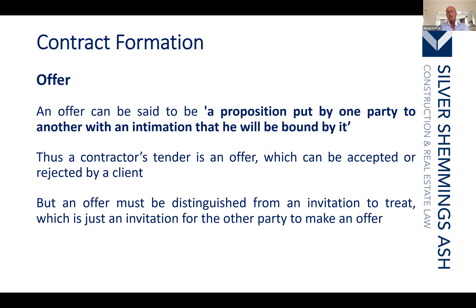Offer is fairly simple — in construction it's generally the offer of a tender. It needs to be distinguished from an invitation to treat. In construction we often send letters inviting contractors to tender — that is an invitation to treat. Similarly, when you see a mispriced item on a shop shelf, that is an invitation to treat. When you pick it up and take it to the till, you are making the offer; the person taking your money is accepting it, creating a contract.